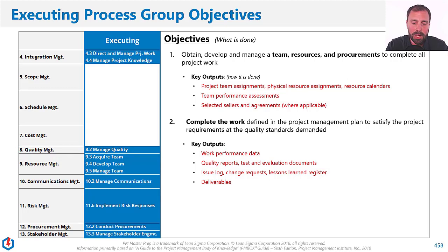The other thing is everything doesn't always go rosy. We all know that, right? So we can have an issue log. We're going to produce an issue log and we're going to update it all the time with new issues that we project and that we have. Then change requests will come out of that. Hey, we need to adjust. We're off our performance, which we'll get into in the monitoring and controlling world. We're off our performance standard that we set, our baseline. We need to adjust because we found this problem or we didn't realize this was happening. So we're going to have change requests, a lot of change requests. And they're going to go through a distinct path, the change loop or the change flow, like we call it. There's another video on the change flow.